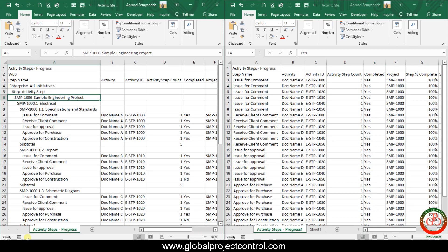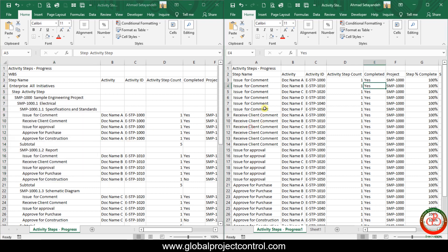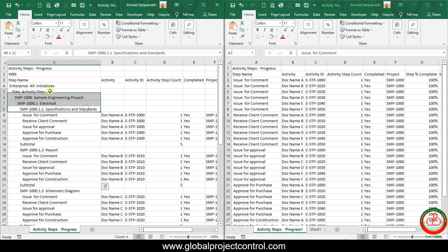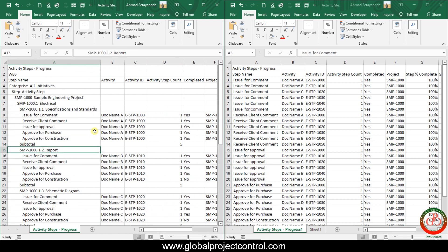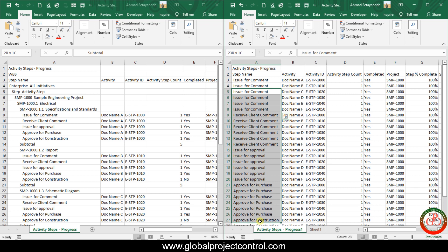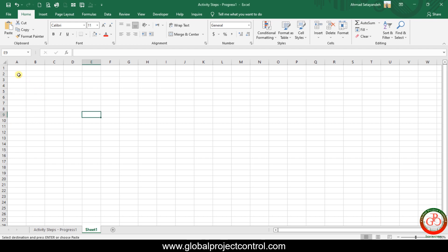Now we need to create a template to collect this information. Let's first compare the two extracted files. The first file has WBS for each step, but our monitoring area focuses on step name, so we don't need to work with WBS. The WBS-based data is not well sorted — it includes extra spaces and P6 generates subtitles. The second extracted file, sorted by step name, is preferred.